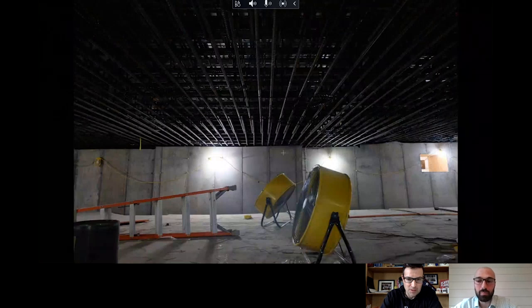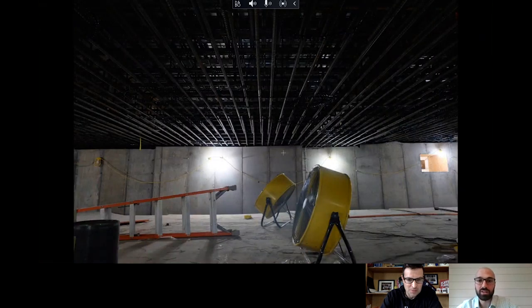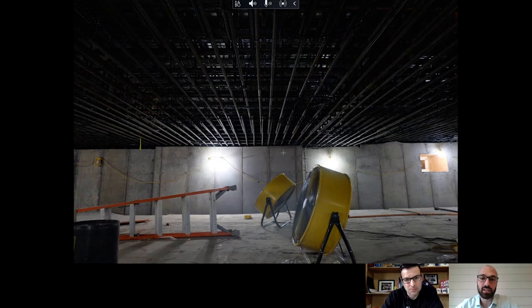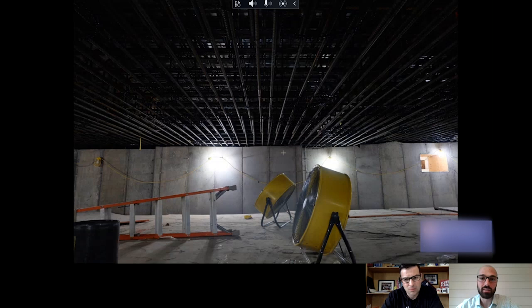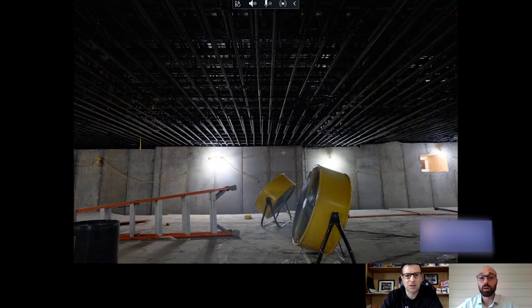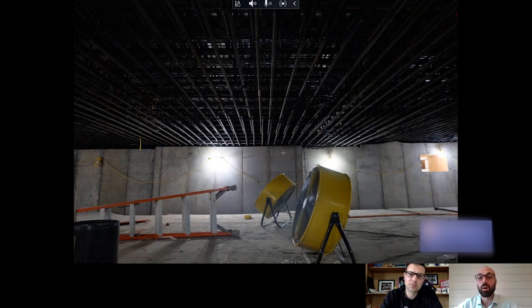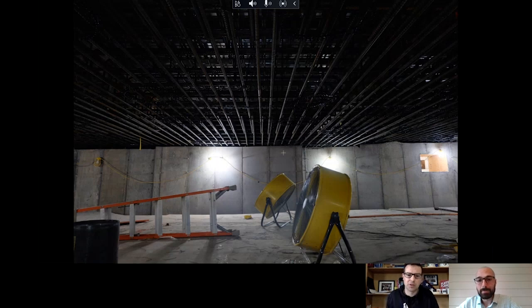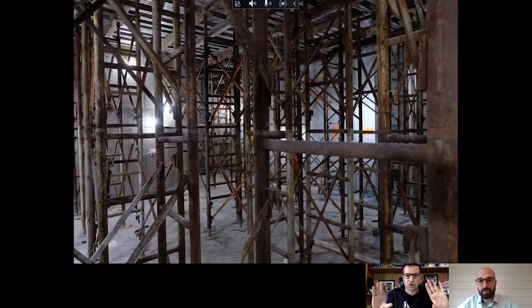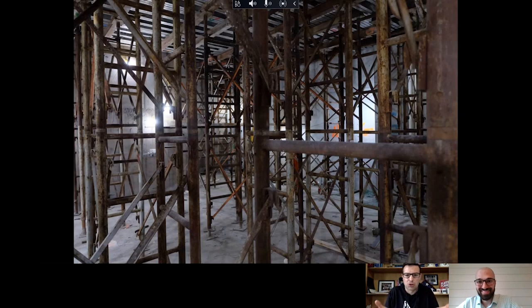So this is a picture from the dance floor that we had inside with our walls cast and the rebar in the ceiling in place, which we actually had to sort of suspend from the beam, from the structure above, while we were tying all the bar together. And then when we put in the form work, we jacked the form into place to relieve all the weight from the existing deck. So you hung all the rebar off the ceiling, but then pulled the... Did you use like periforms or something like that? And just almost pushed up on that rebar.